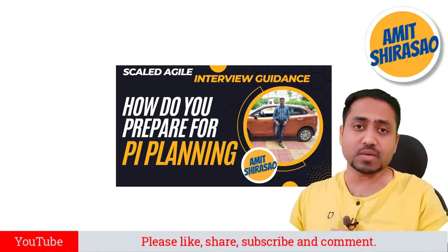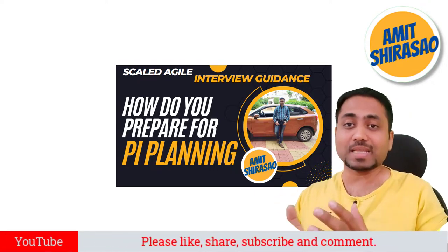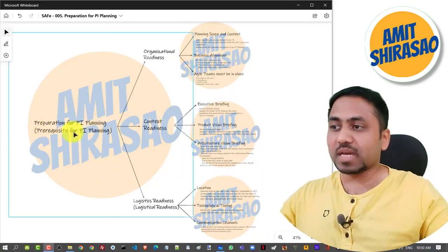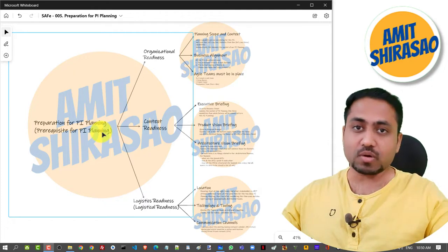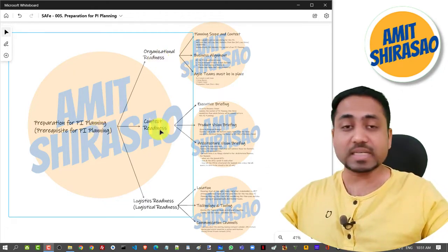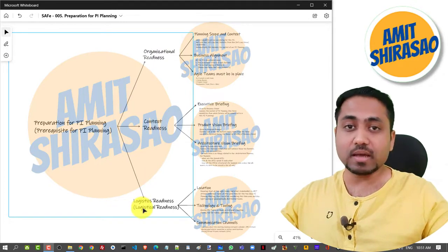So how do you prepare for a PI planning meeting? That is also called as PI planning readiness. This video is about that. So PI planning preparation or PI planning readiness consists of 3 things: organizational readiness, context readiness, and logistical readiness.